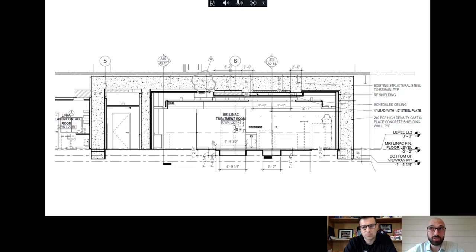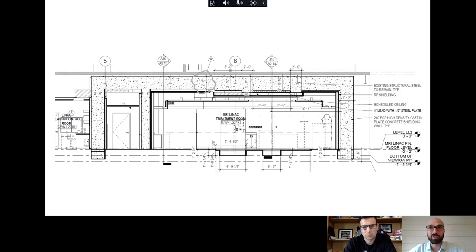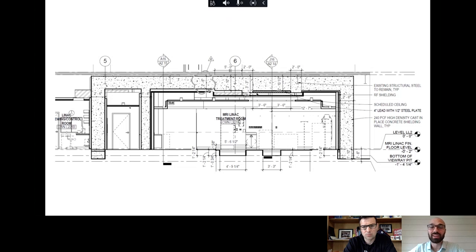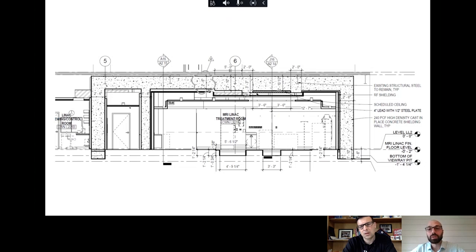And we actually did performance test mock-ups where we created a similar environment where they'd have to pour this thing sort of blind and make sure that we could get the concrete to flow evenly across the top while using only two cores five feet apart. And we'd peel back the slab that we made out of plywood and see what kind of variation we had in the top of the concrete to see if we could make sure we could pour within three inches from the underside of the deck. So we did like a proof of concept placement. We struggled a little bit with the iron content. We had to find a couple of iron ores that were non-ferrous or that had an iron content below 13%.